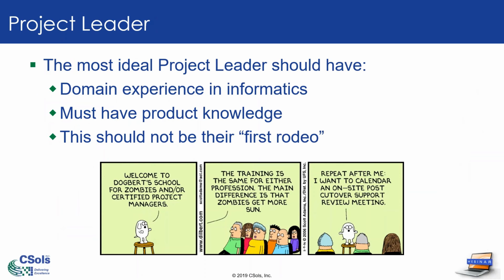So who's a project leader for an informatics project? Well, a project leader should have domain experience in informatics. You don't want somebody who has not had experience in the laboratory deploying a laboratory computer system. What you do want is somebody who has that experience. You also would be looking towards somebody who has knowledge of the product to be deployed, because they can ask the smart questions, they can challenge the team, they can also assist the team. This type of project is not the type of project where it should be their first rodeo.